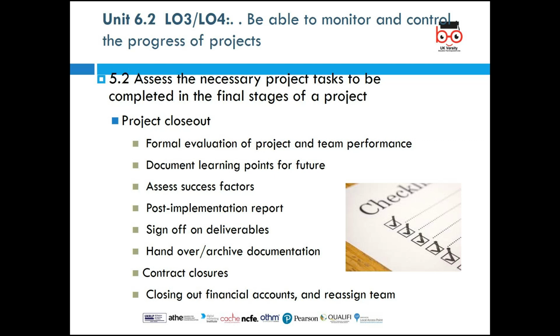Every target that you set yourself within the course of the project, at every phase of the project, make a checklist. Make sure everything was achieved, and then sign off. Having signed off, you have to hand over the project and then archive all documentation.